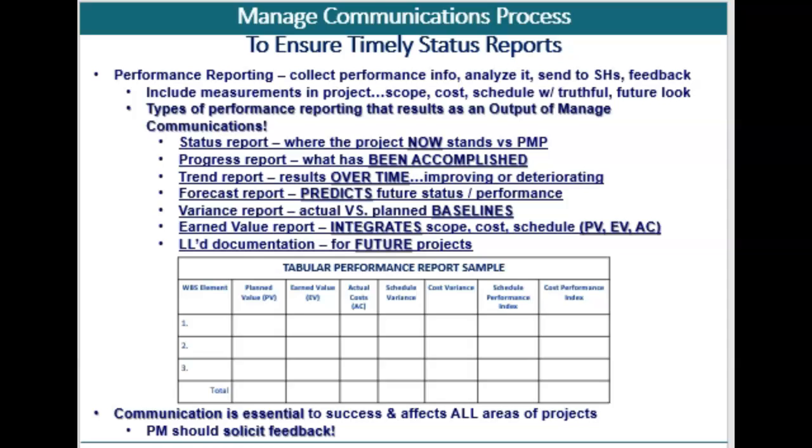The progress report, what's been accomplished. A trend report, right? What are these results over time? Are we improving or deteriorating? Essential in risk management to highlight triggers. Forecast reports, which is going to predict the future status.